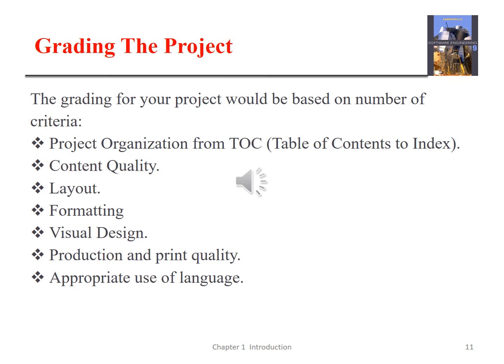In our case here, with a technical document, the sequence of the activities is the most important thing in the document. We should find out which one we are going to do first, then what we are going to do next, what activities we could do concurrently, and what previous activity has to be done before I could start this activity. We should find out what activity belongs to the analysis and what activity belongs to design.